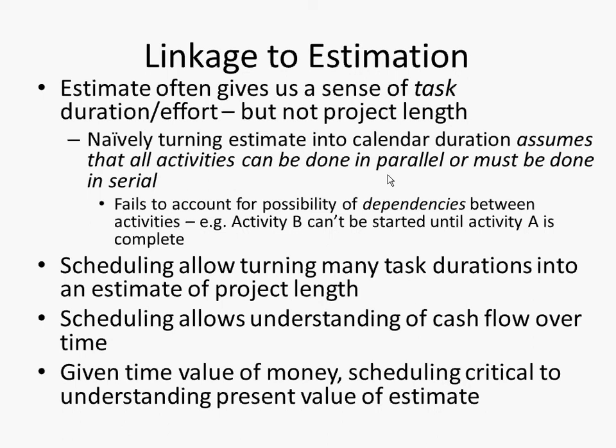Yeah, exactly. It depends a lot. Maybe the 3-day task could be started at the same time as the 4-day task, in which case the total time is just 4 days. It's the maximum of the two of them, right? You have them going on in parallel. On the other hand, if the 4-day task requires the 3-day task to finish, then you've got 7 days. Big difference. You appreciate that?